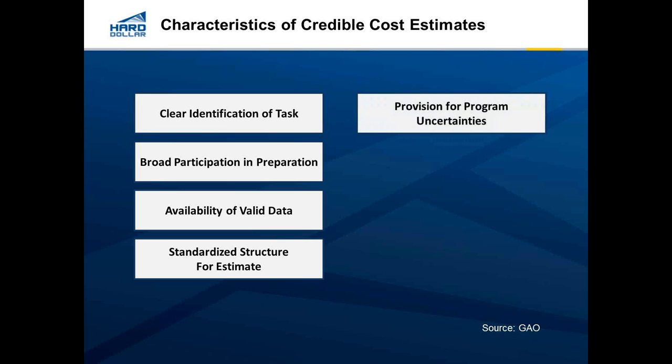We also, like I mentioned before, we really need to take any risks into consideration. Some of those risks we're going to be able to foresee, some of them we're not. The ones that we can foresee, we want to include those as items in our estimate and have costs for them. And we also want to have a bucket of some sort, contingency or what have you, that we can draw down on to apply to the unforeseen things that are for sure going to come up, guaranteed in any project. We know there will be some surprises as much as we try not to have them, and we need to make sure we're covered.